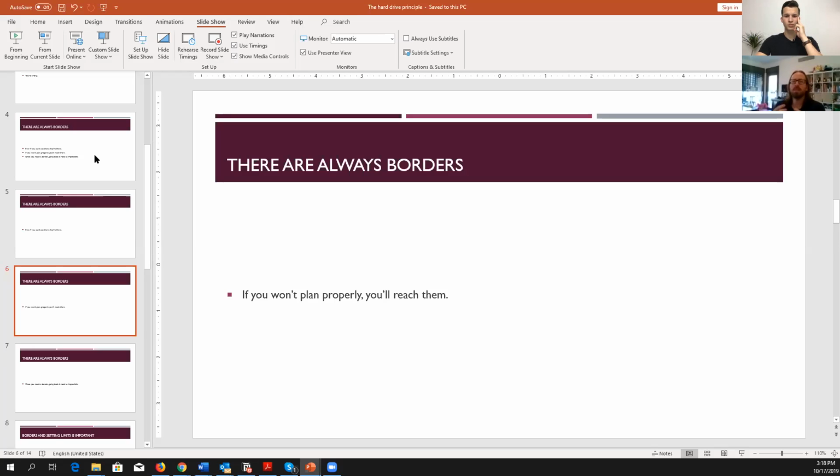If something suddenly happens during the project and you're not getting what you need, update and discuss this with your client and tell him this will cause a delay of X plus 1 days to our plan, and it will influence, and you need to revisit your plan and see exactly how deliverables that are not delivered on time are slowing your progress down.